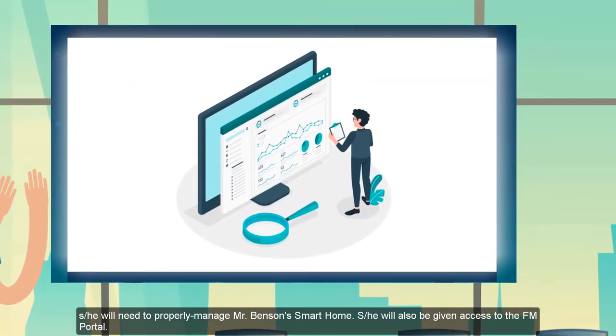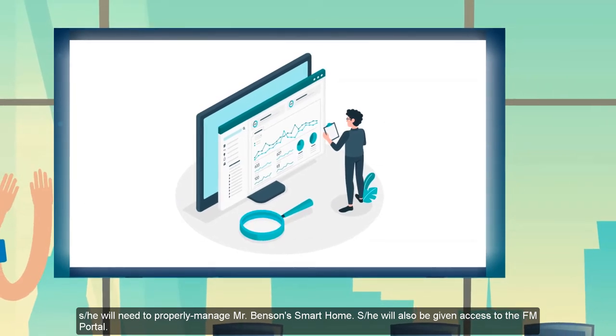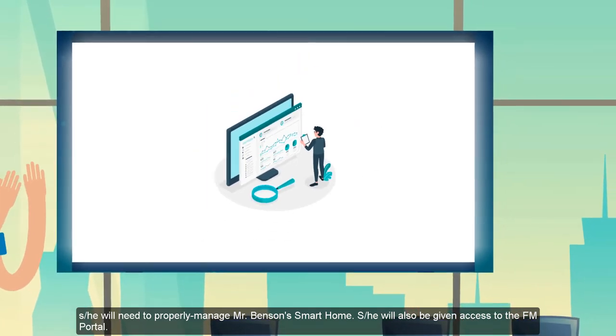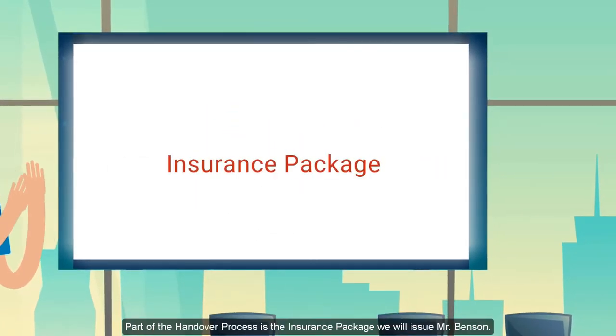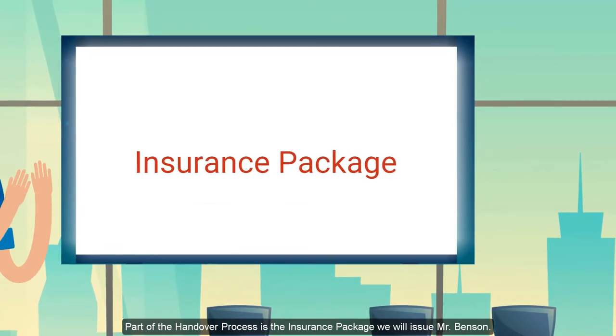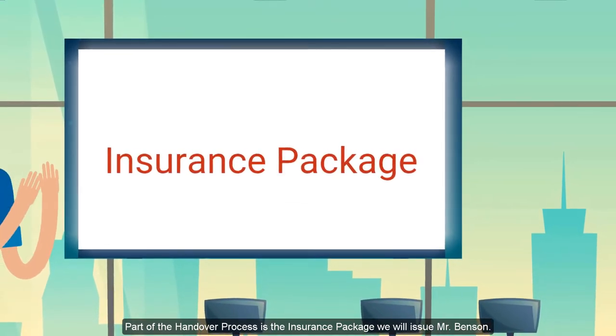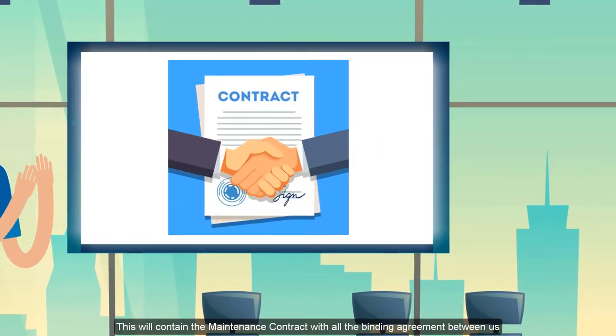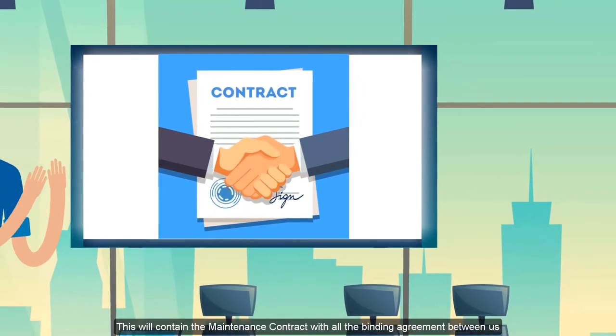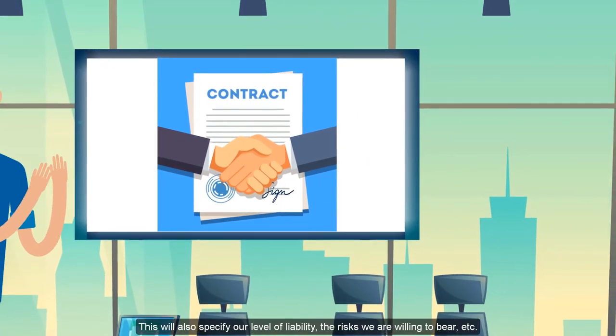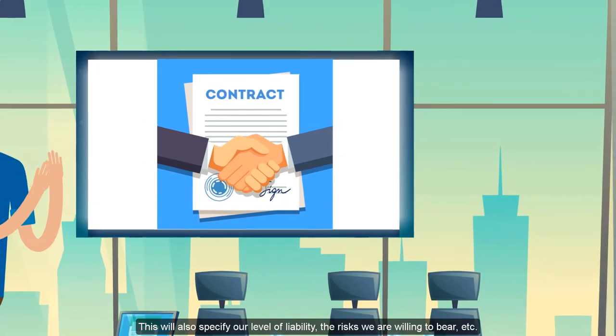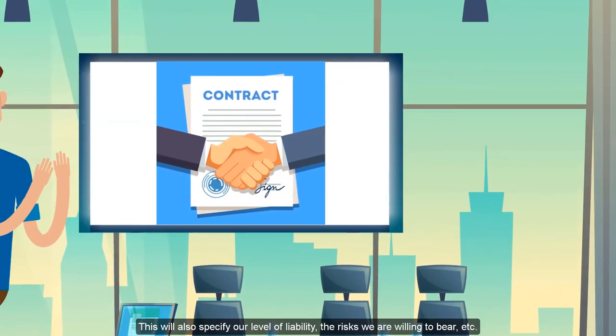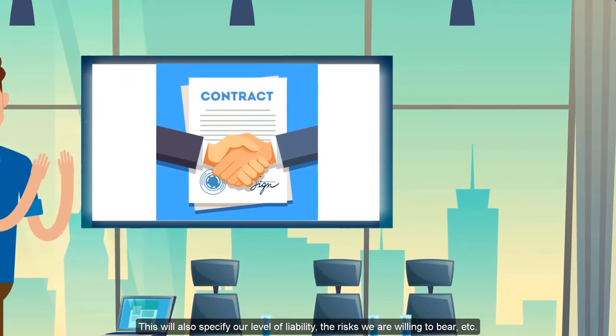We also give him access to the facility management portal to properly manage all the documents. Part of this process is also the insurance package that we give to Mr. Benson, which will contain the maintenance contracts between us and him.